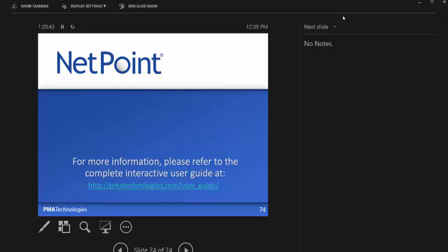Following on that subject of hammocks, if I have design with four phases in hammocks, and I would like to put a larger hammock over the top of that, I always find you're limited, you can only share one hammock. Is there a way around that? Maybe add a start and a finish milestone or benchmark, exclude them from the first hammock, and make those members of your larger hammock. Got it, so you're just marking the total duration. Yeah, and all the activities were members of the first hammock. Gotcha, that's the way to do that. That's a nice trick.